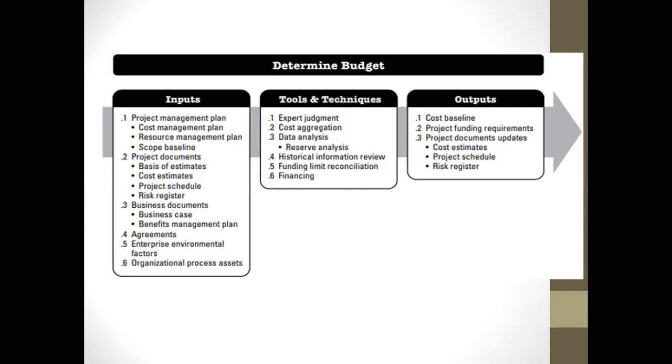Then financing also. Financing here will look at how project budget will be disbursed. Is it going to be a one-off? Is it going to be a lump sum contract? Is it going to be a firm fixed price contract? Is it going to be a cost reimbursable contract, like as you go on, we'll pay you based on the phases and milestones that have been achieved? Is it going to be when you finish, we'll pay you? So these are things you consider in the financing region.